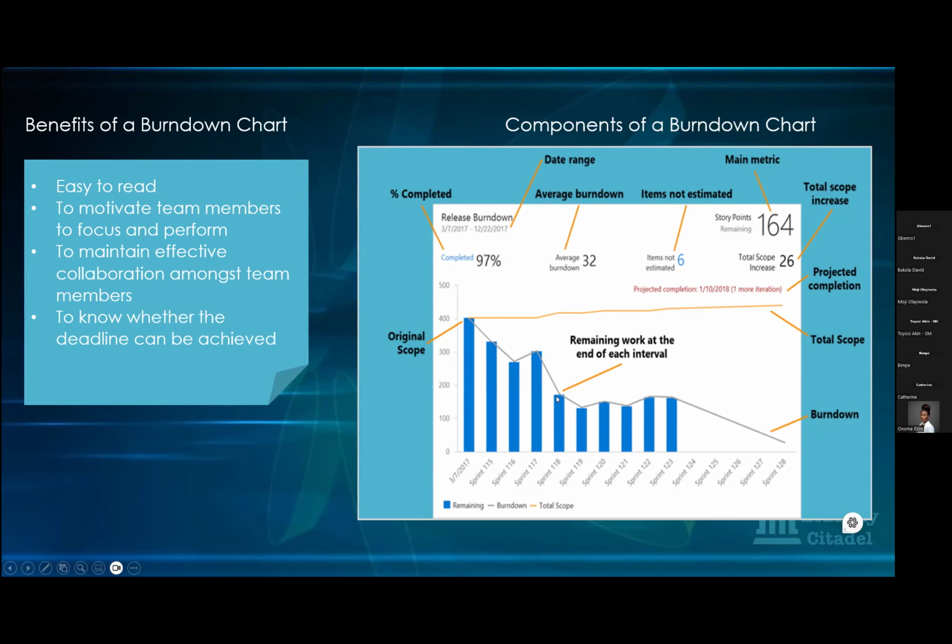Again, they went down to less than 200 here, further to maybe 150 here, and then another addition. Then they worked on something, it burned down again, then another addition. And between this print and this print it is flat, nothing was done. So those are the ways you would know. Even you yourself will know through this bar, you're able to see when those increases came in.